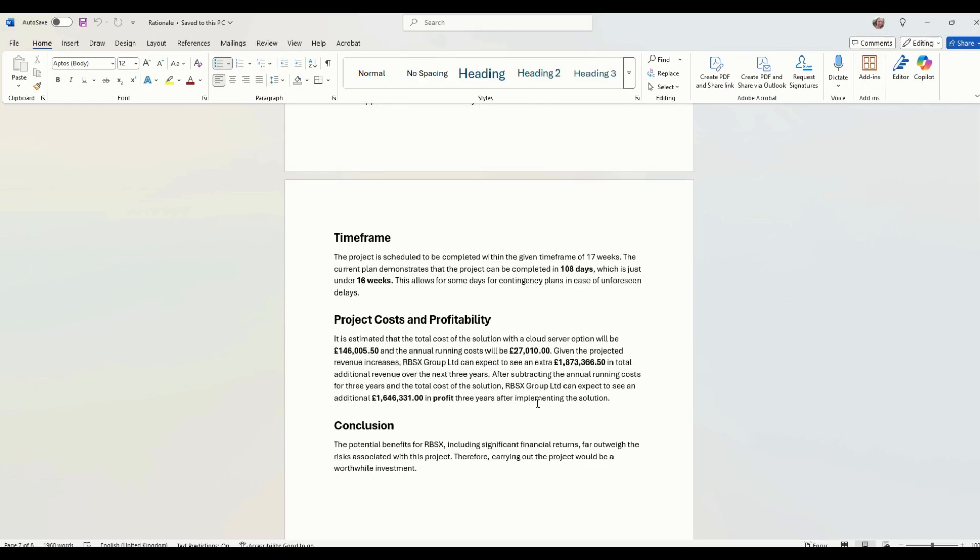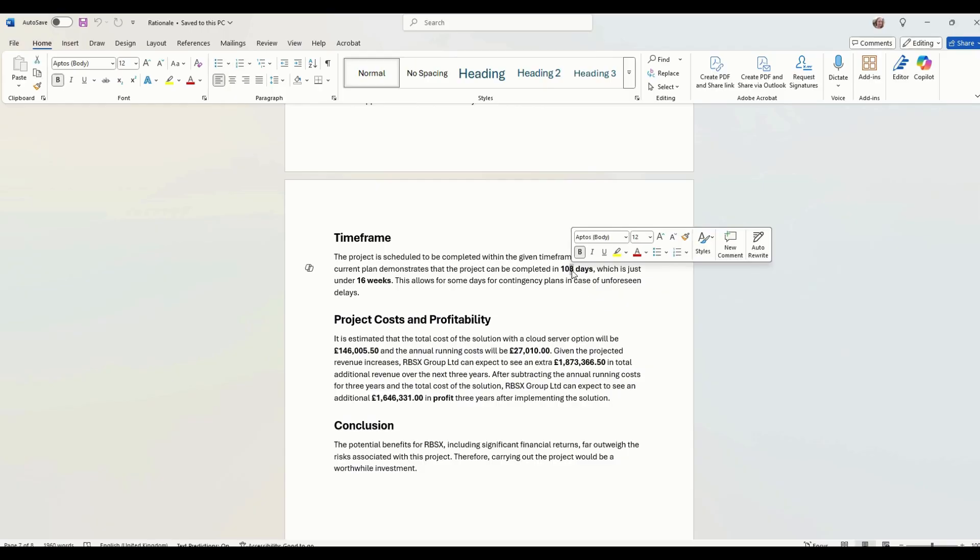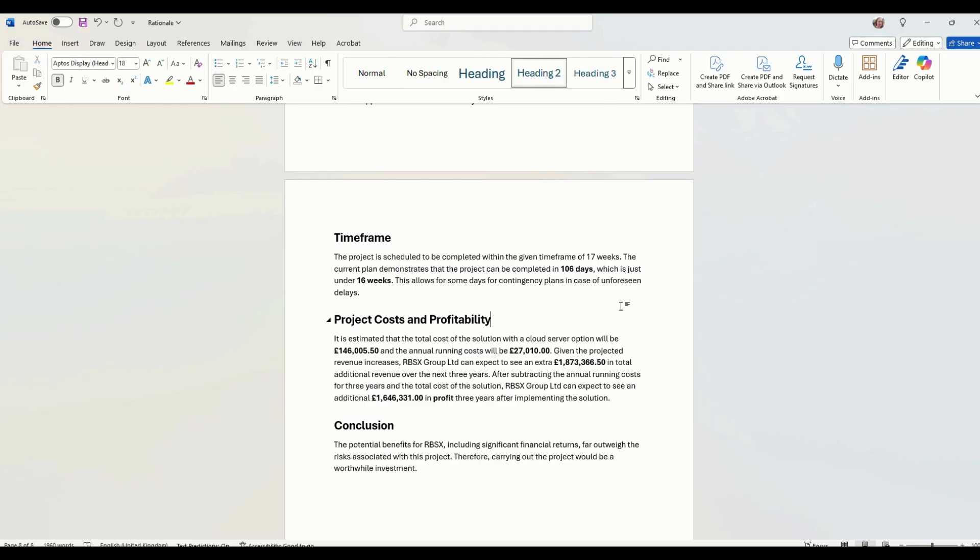Current plan demonstrates project. I think it was completed in 106 days, actually, so we'll just change that. Around about 15, 16 weeks. So this allows some days for contingency plans in case some unforeseen delays that we spoke about earlier.